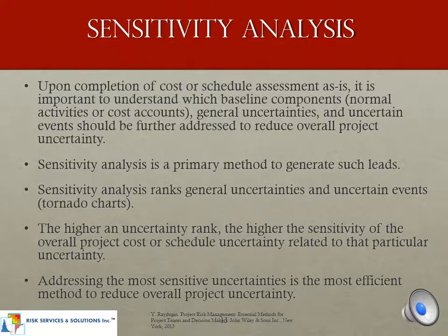Number one, upon completion of cost or schedule assessment as is, it is important to understand which baseline components or normal activities or cost accounts, general uncertainties, and uncertain events should be further addressed to reduce overall project uncertainty. And this sensitivity analysis is the primary method to generate such leads.